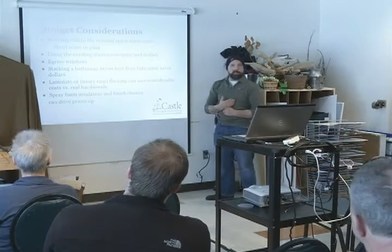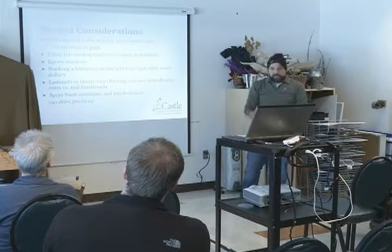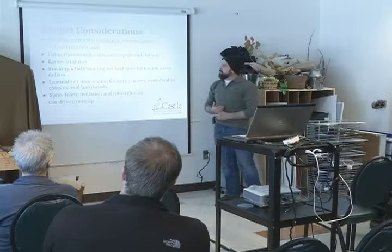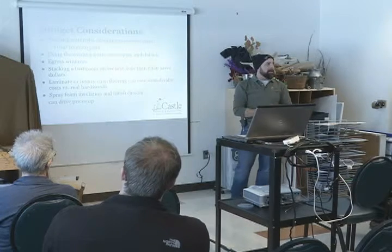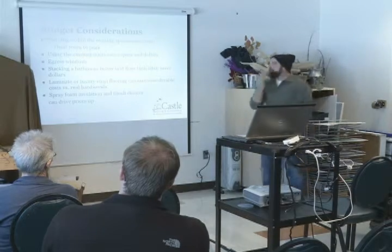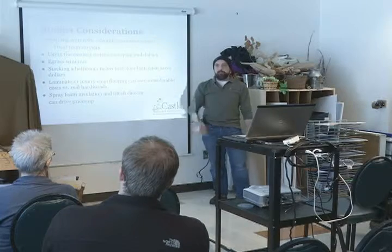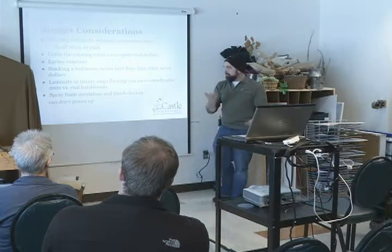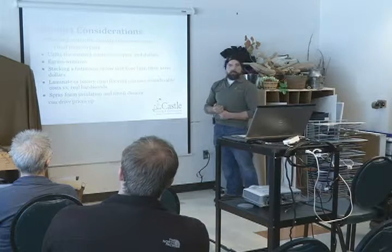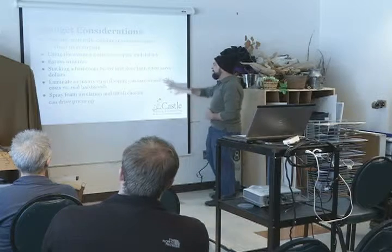Stacking the bathrooms, as I said, finding that 4-inch main waste stack pipe and being near there is helpful. I've found that when being near that stack pipe really ruins the overall layout and we've got to move the bathroom, it's about $1,000. So it's not the end of the world, but as you're looking at budget, this is where we want to help you figure out where is it important to spend $1,000 and really that you love the basement, and where is it something that we want to keep on the not spent side.